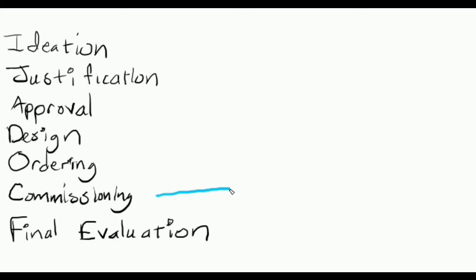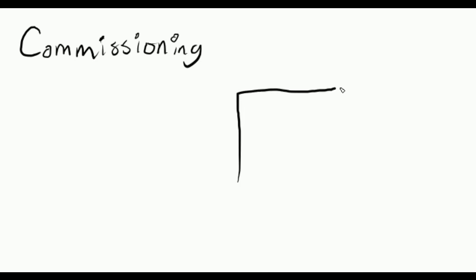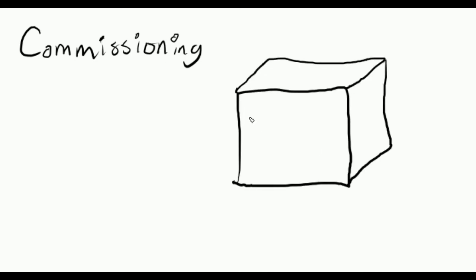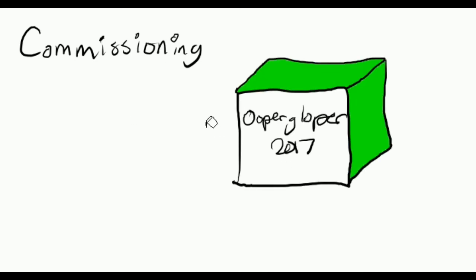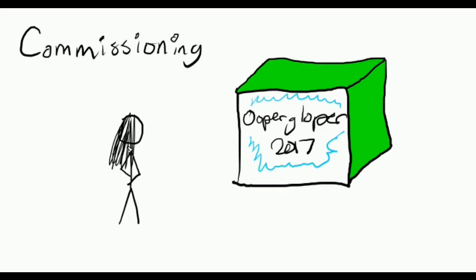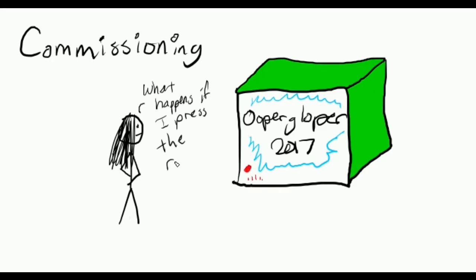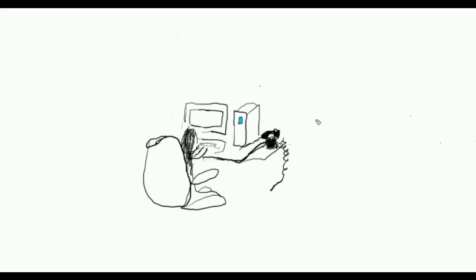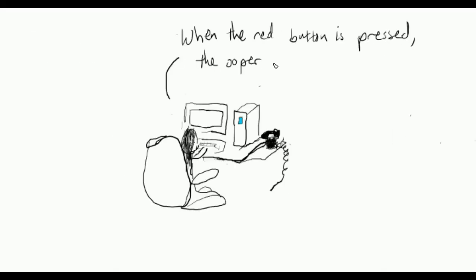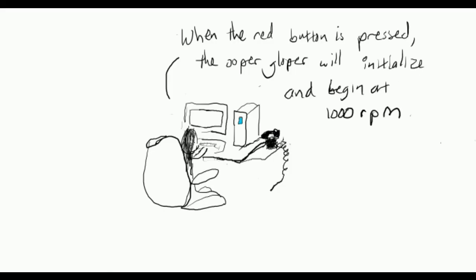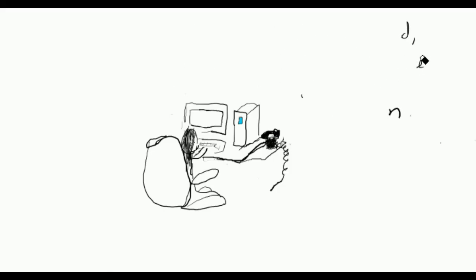Phase six, commissioning. When the equipment has arrived at our facility, it needs to go through a commissioning process. This is the process by which we prove the equipment's operability and effectiveness. During this time, work instructions are finalized, maintenance schedules are developed, job safety sheets are created, and operators are trained in proper use of the equipment. This process is critical for prolonged success with the equipment.